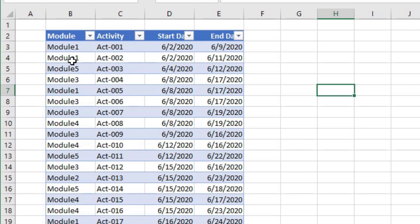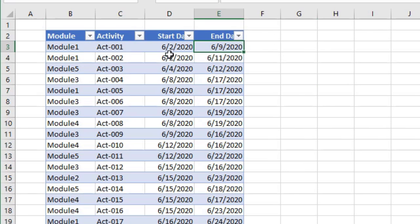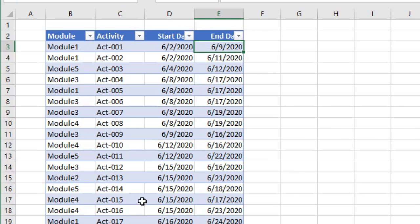So let's get into the construction process. Here is the sample data. Obviously, you need a module and activity and then a start date and end date. Potentially you can also have another set of start and end dates. So you could have like a plan start, plan end and actual start and actual end date. And you can even tag the activities as different types like milestone or a regular activity or testing activity, one of those kinds of things, depending on what else you have there. But I'm just keeping it simple so we can focus on the concept first and then you can go ahead and add those things in the download workbook.